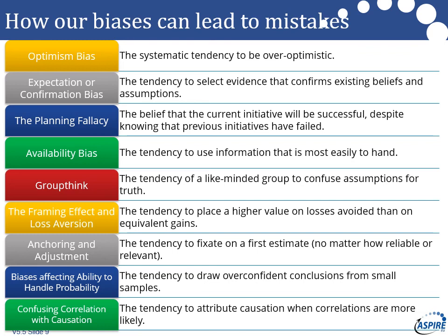Anchoring and adjustment. You see this all the time, particularly in capital projects, where there's a tendency for the first guess to be taken as the definitive answer. Massive problem, particularly in the public sector, because then the Treasury goes off and budgets a certain amount of money, and then gets upset if you ask for more. Think of things like High Speed 2, Crossrail, all those big ones. The initial estimates were horribly wrong, but everybody's judging them against that initial estimate.